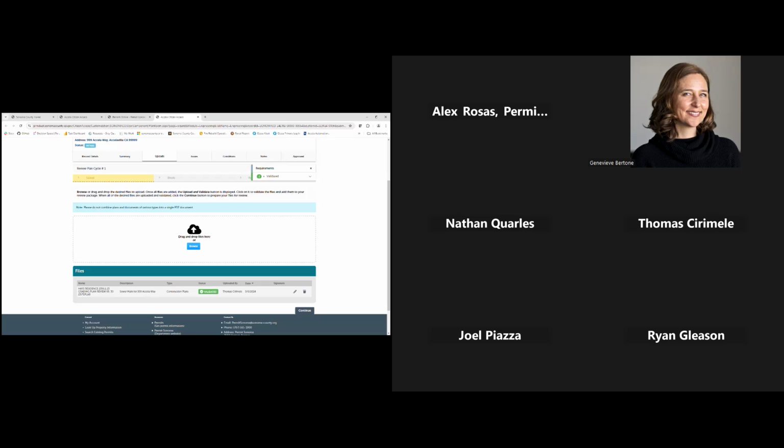That's what we need. And so if you're uploading a JPEG or a picture of something, or a Word document, some of those things can cause problems on our end, and it just delays the review process. The other thing that it's really looking for here is it's not uncommon when the PDF comes in for somebody to have put a password protection on there, or maybe a PDF document has been corrupt for whatever reason. And it's checking for those things.